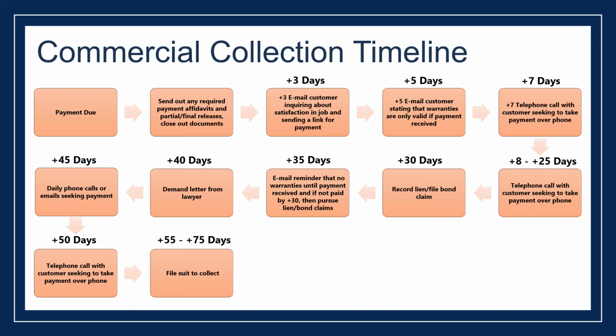Keep in mind that lien claims and filing suit on lien claims is important because as more and more customers file bankruptcy, a lien claim is a secured claim. That can be the difference between you getting paid as a secured claimant and you getting paid as a non-secured claimant. So just a contract claim, which is what you have without a lien, puts you in that non-secured category, which means you're probably not going to get paid a dime if somebody files for bankruptcy. So just be thinking about that.